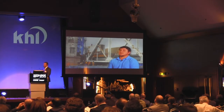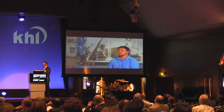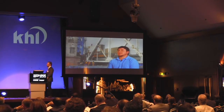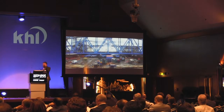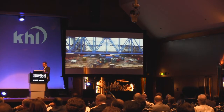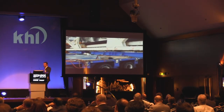And the third and final solution that we actually used was to take existing counterweights out of the Basque Bridge and have them relocated onto the toe of the bridge on a frame that would distribute the load evenly. This relocated the center of gravity approximately 45 feet, allowing us to capture it with our transporters. The transporters were reconfigured on the barge outside of the channel, and the barge re-entered the channel for the lift of the Basque Bridge. When the second rail closure commenced, we repositioned the barge and reattached the 4-point mooring system following the same procedures utilized during the installation of the new bridge span.